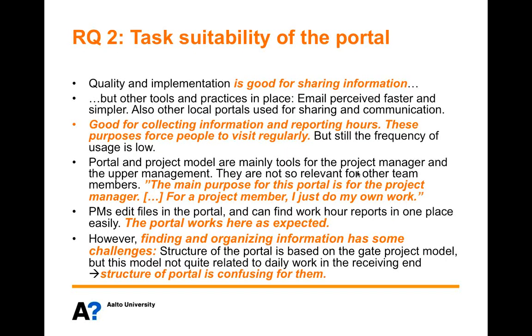So the next research question was how well the portal is suited for the task. In general, it can be said that the quality and the implementation of the portal is good for sharing information. But then there were other things that created the challenges. There were other tools and practices in place. Some people perceived email as faster and simpler than the portal. And there were already local portals used for sharing and communication before implementing this portal.